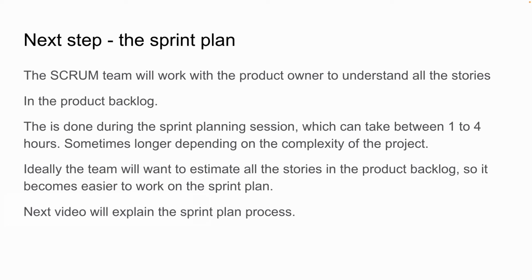Then during the sprint plan session, they will try to understand each of these stories, ask questions to the product owner, and then estimate each of these stories according to the understanding that they have. They will give an overall estimation in story points using, for example, the Scrum Poker. We will also have a look at that later.